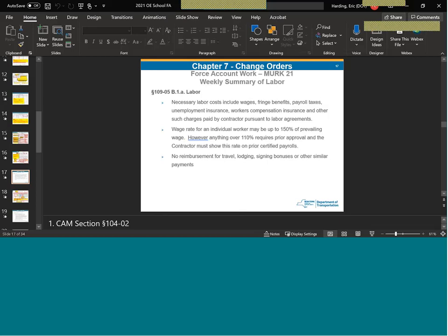So it looks like that field is going to have to be opened up to give the user the opportunity to put 5% or 0 down for profit and overhead. I'll talk that over with Amelia and Erica, and we'll go from there, and just confirm that is the case, because that's how I read the specification myself. I'm in agreement with the RE. So it looks as though the spreadsheet's going to have to be updated to give the user the capability to make it 0 instead of 5% for the profit and overhead.